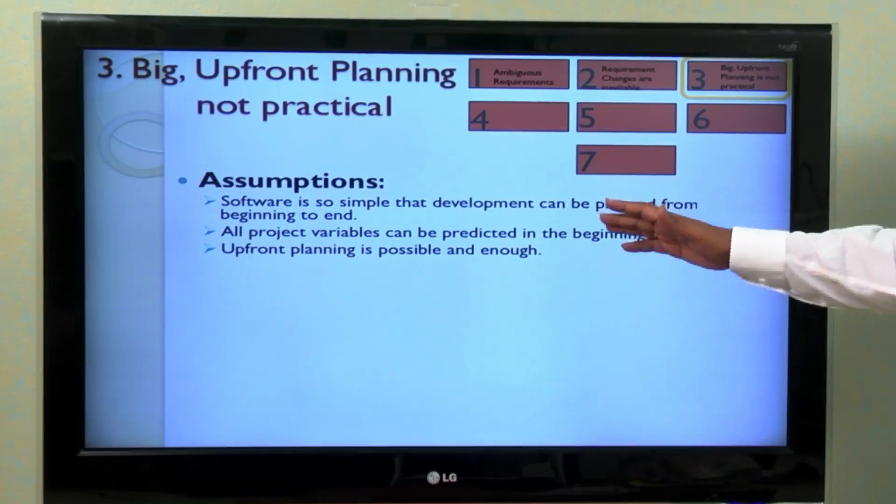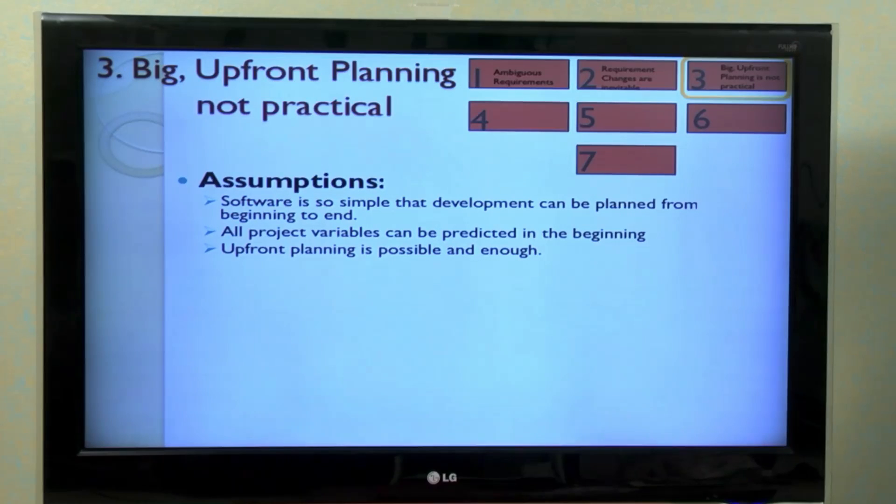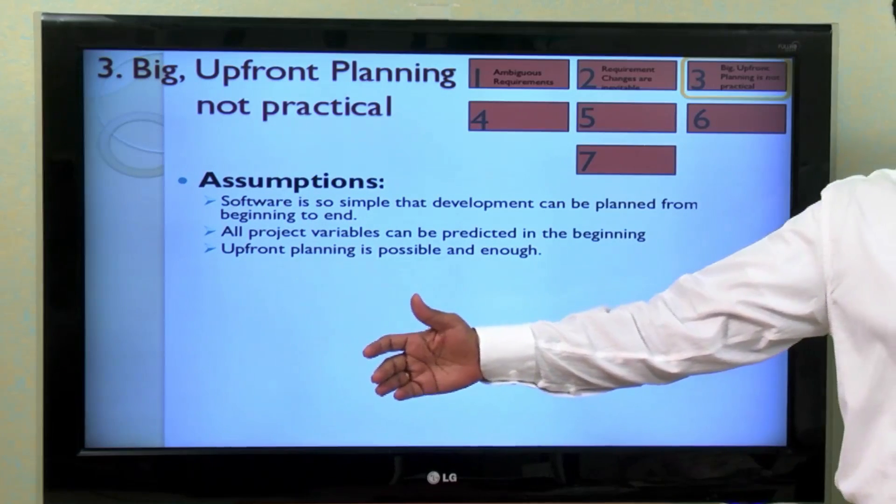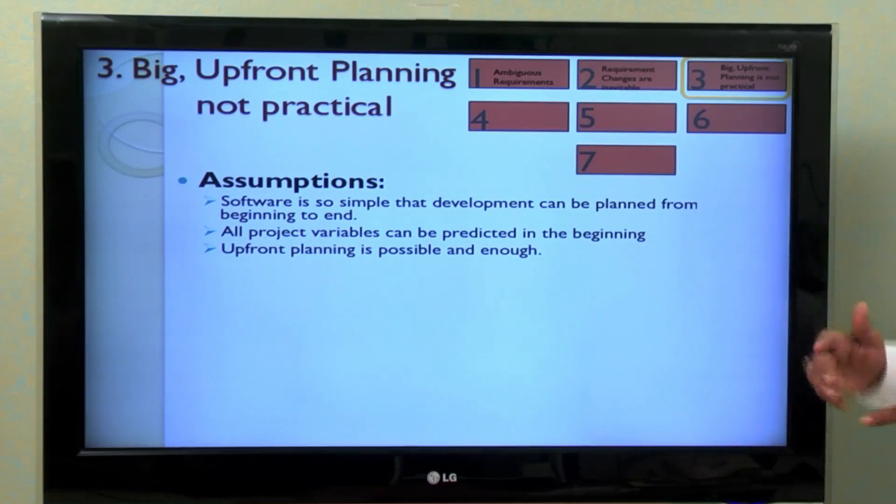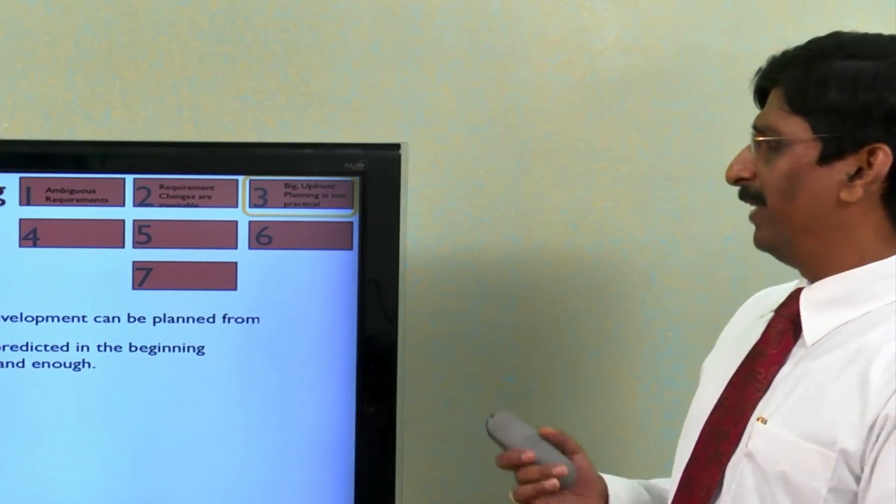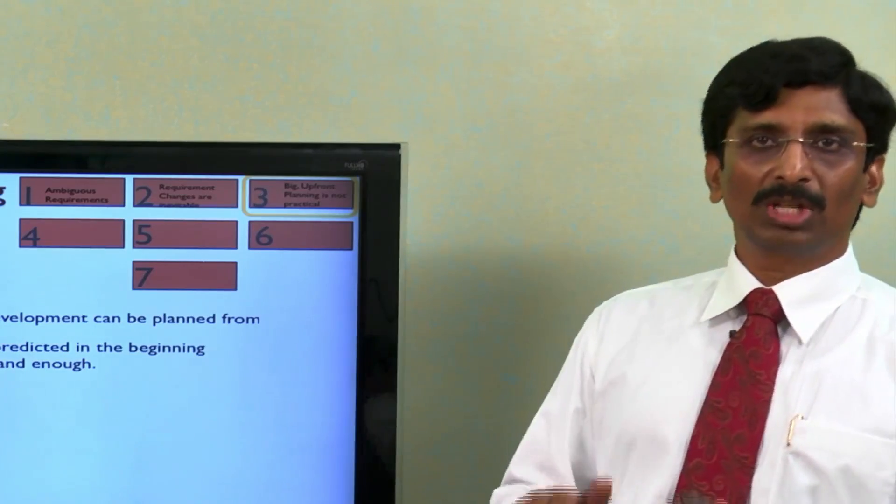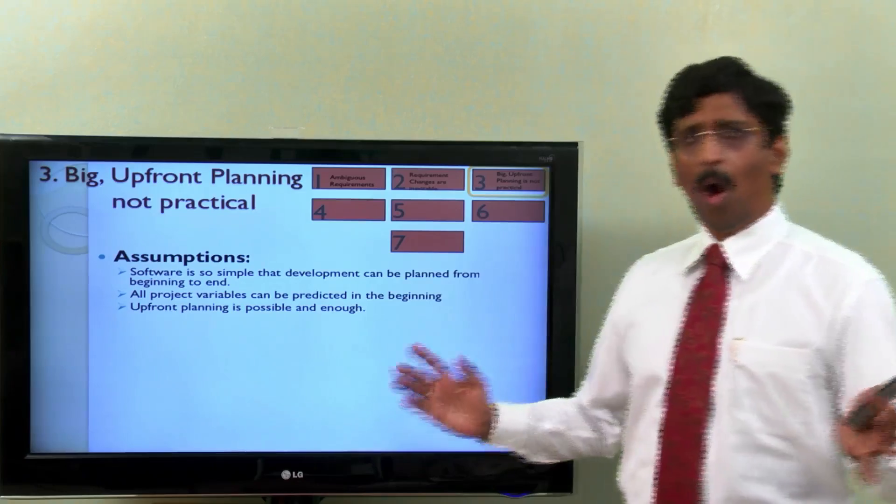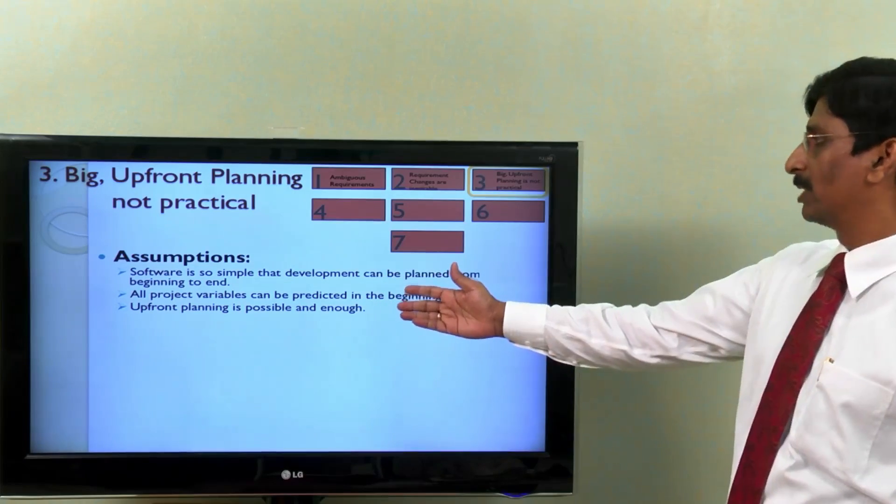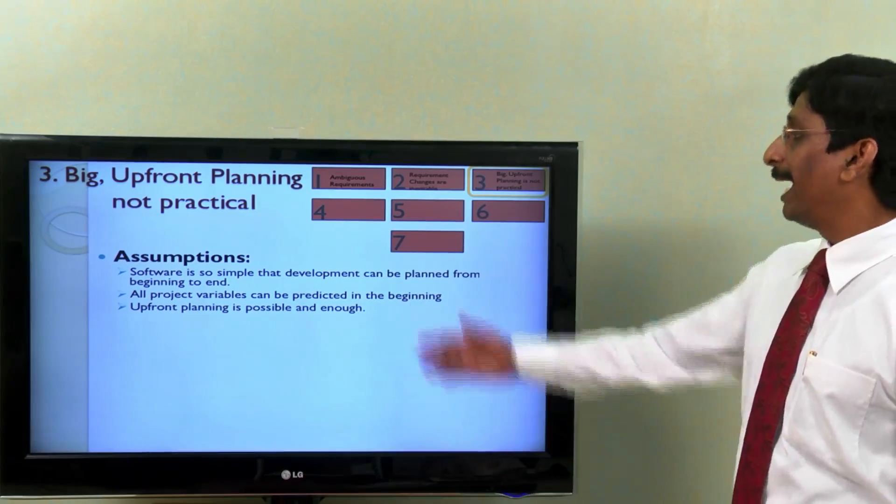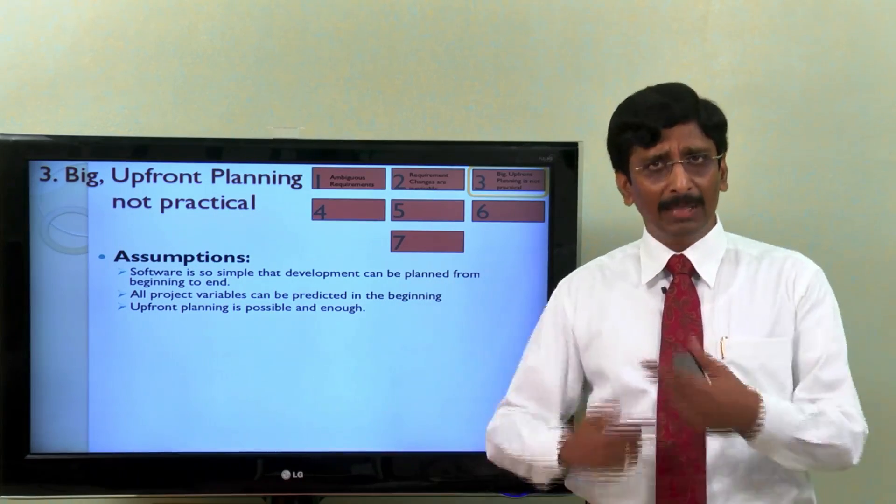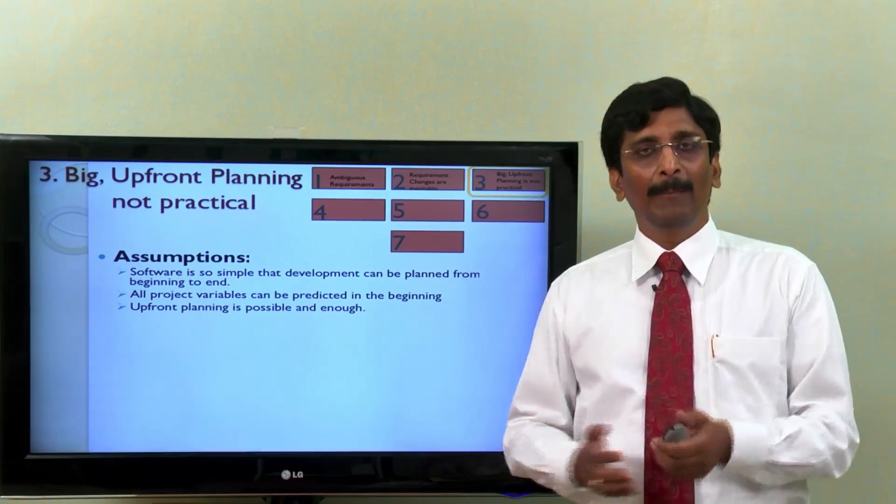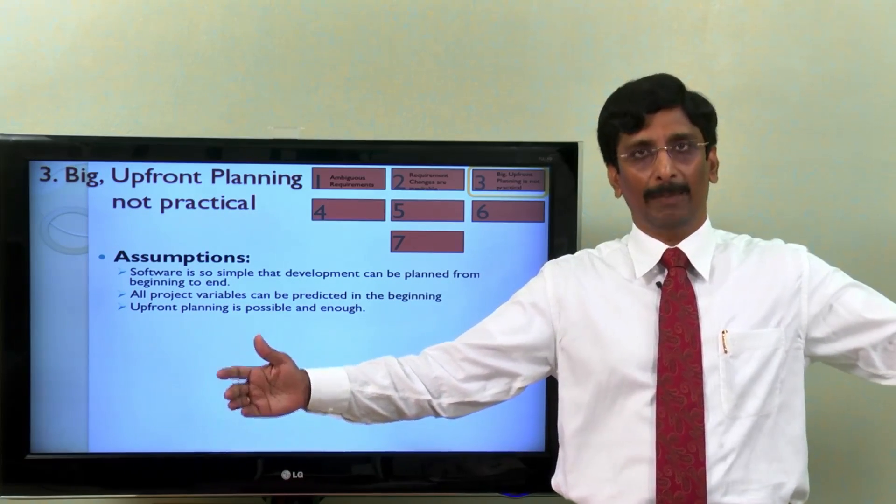So what are the assumptions? Why do we assume this way? We assume software is so simple that development can be planned from beginning to end without any problem. We also assume all project variables can be estimated or predicted in the beginning - project variables could be your scope, your size, your cost, your resources, your schedule, your risks, everything. We also assume upfront planning is possible and enough.